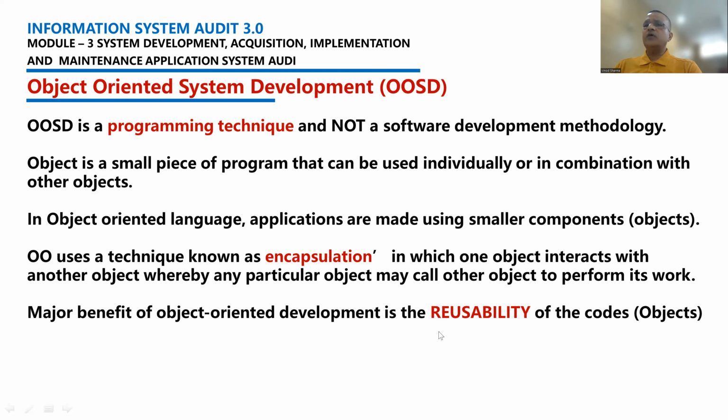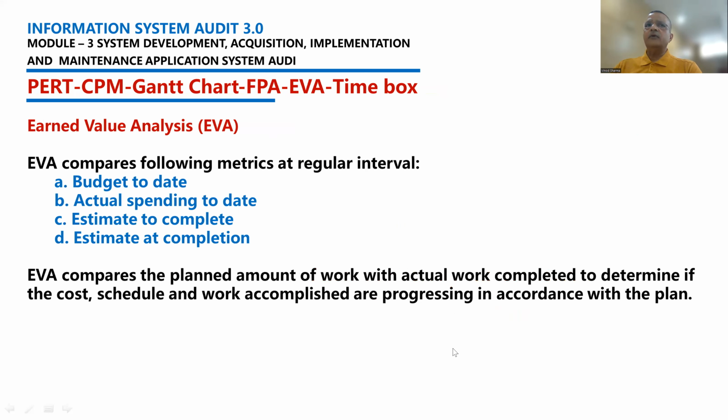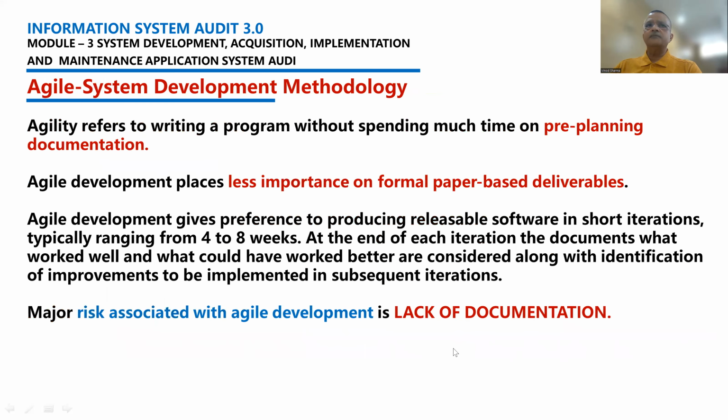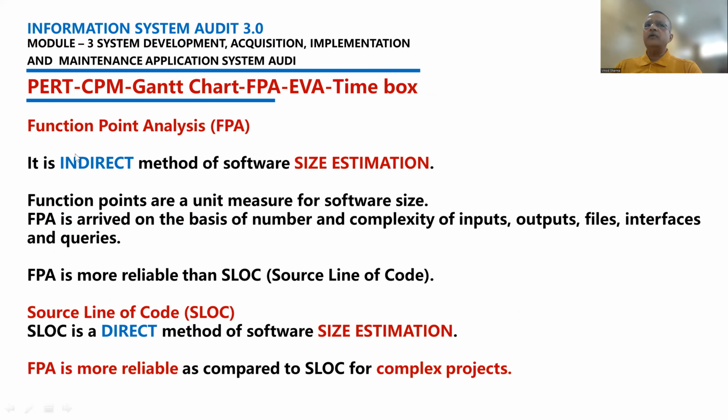Now, this was the reason when I spoke about function point analysis and source lines of code. If reusability is there, you'll realize that the size estimation will be very small. If I'm estimating the size of my software, it could be very small, because the number of lines of code will be less. Each time I require a function, an object, or a method, I just give a reference to it, and it will be called from the central repository, used, and put back again.